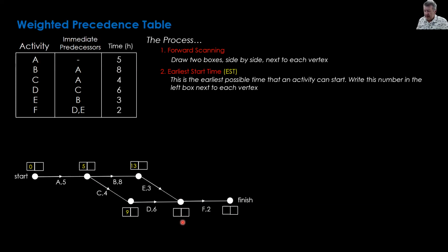I'm going to move this pair of boxes down a little bit because this is the trick that I like to do, which makes it easier to see. Let's have a look up the top here. I've put a 16 there. Where did that come from? That came from up the top arrow in, the top edge in, 13 plus 3 is 16. I've got a bottom edge here, which is 9. Add 6, it's going to be 15. So I'm going to write that one down the bottom.